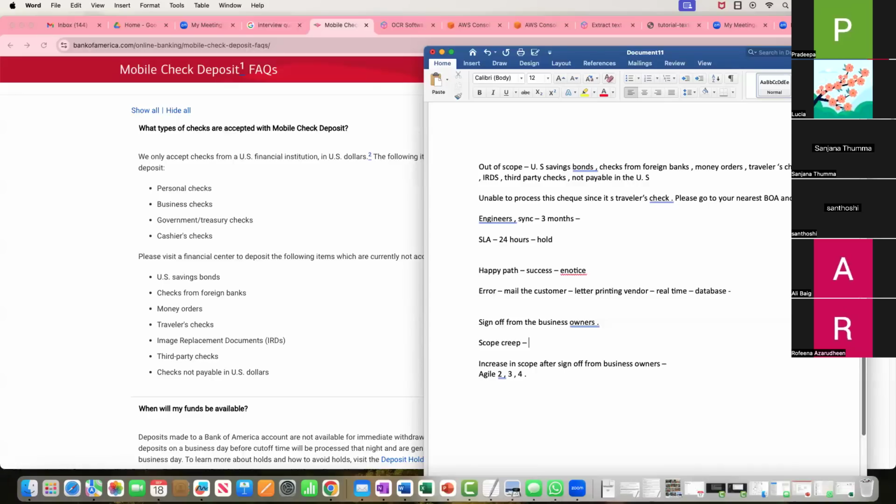We agree to something, and our developer is already in the phase of development. And when you come and give us all this increase in scope, and you will see it at almost every day, don't underestimate the way of telling no. So you have to tell them no, and you have to tell them that I'm saying no because I cannot guarantee you anything today, because I have to discuss with my scrum team. And also it's going to take money and time, because I don't know what the complexity of the requirements is, whether we will be able to do it or not. That's one thing. Or whether we have enough resources, time, and also priority, whether we have other projects that have priority over your project, right? There are a lot of factors that we have to consider.